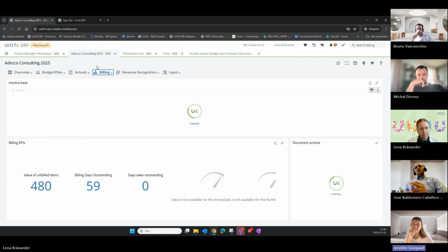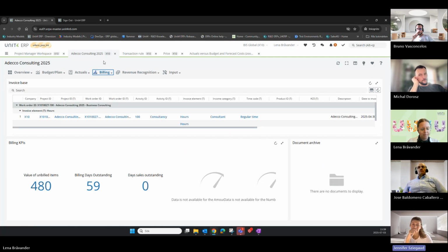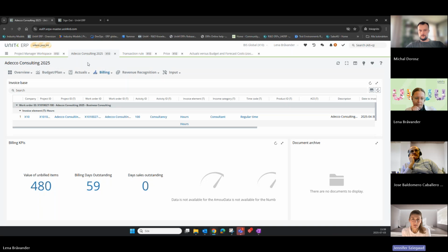And the other one says everything's fine, it's a status notification. So either green is all good, all on track, and red is something to pay attention to for that specific. Yeah, it is. And depending on how it's set up, it could be based on percentages or amount levels, and that could be something that we set in the models, but depending on the size and type of the company, they would need to adjust that from what we have. So there's a default setup, with the option to customize based on whatever the user needs.